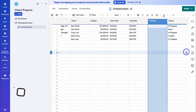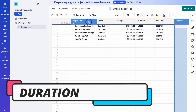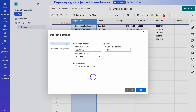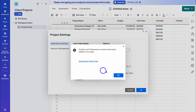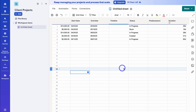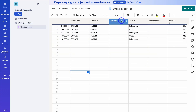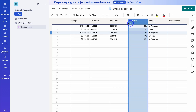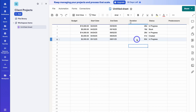To do that, simply click OK. Then navigate over to your primary column and right-click or click the three dots, then navigate down to 'Edit Project Settings' and enable dependencies, then hit OK. Here we can customize the working days — at the moment they are Monday to Friday. I'm happy with these default settings, so let's click OK. Now if we navigate across, you'll see we have a duration column. I can click and delete the old timeline column, then drag the duration column and place it next to the end date.